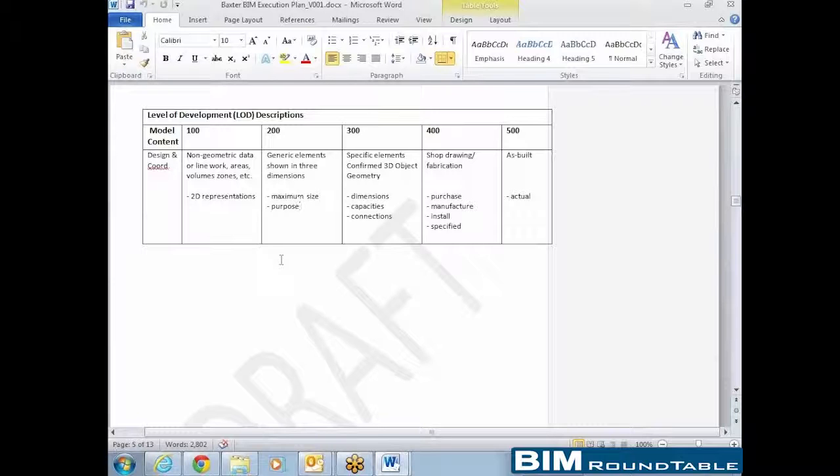So what we're working towards is, taking the contract aside, really internally how we would run more efficiently. If I had certain inputs from what this will say and they have certain needs and they want it early on, we push those forward on the matrix. And then other characteristics could push off a little bit later. So then if the contract and the client say they want certain things at a certain point, then you can add that in. All things being equal, we have this as efficient as we can get it at the time.